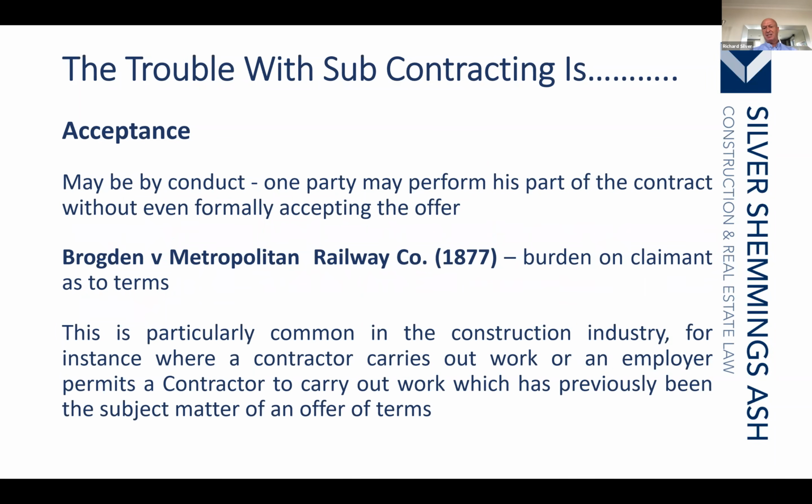Now, as far as conduct is concerned, again, let's go to our standard scenario. Invitation to tender is issued stating main contractor's terms and conditions shall apply. Subcontractor submits their tender stating their terms and conditions apply. Contractor submits their subcontract order stating their terms and conditions apply. And the works are ongoing on site. Well, where's the acceptance? Well, the argument is that the subcontractors are on site, they're carrying out works, they must have accepted by their conduct.